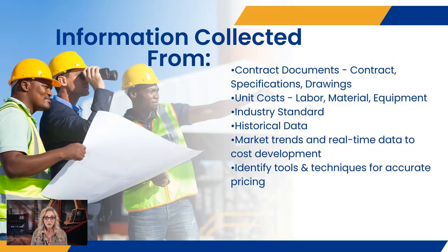If you have a $400,000 house and it's a middle of the road house, you can anticipate that it's going to cost somewhere between $285 and $390 per square foot to build, depending on what kind of finishes you have. But you could easily take that same $400,000 house and make it into a $1 million house by changing up the different items that are going to be installed in that house.